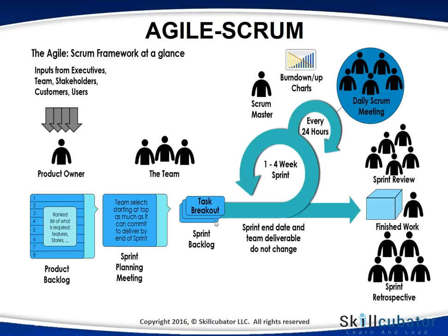When I say complete, that means it must be designed, developed, and tested, free of defects, bugs, gaps. So if the user was supposed to use it, it would work end to end. So they take the work, they put that in the sprint backlog. The sprint runs for whatever duration you have selected, from 1 week to 4 weeks. So in this case, let's assume that we have selected 2 weeks. Our sprint duration is 2 weeks. So for 2 weeks, the team will work towards all the stories which have been committed as part of the sprint backlog and complete and give it to the